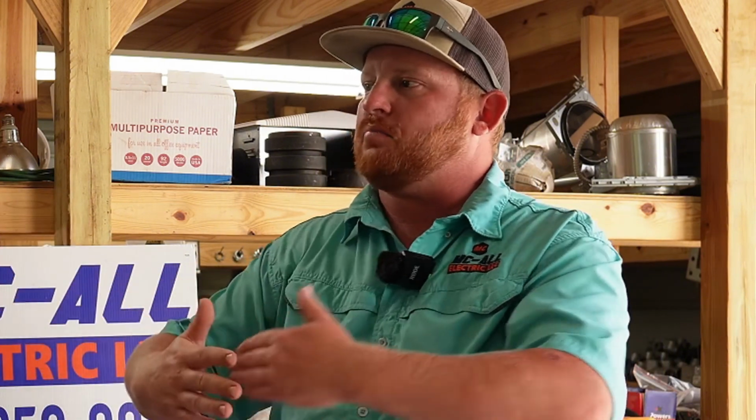So for instance, if I tell you, hey Zach, as your electrician, today in an 8-hour day, we're going to have A to F done. And then you come to me at 2 o'clock and I've got A to C done, then you know, okay, I was waiting on you to finish so my granite guy or my plumber can come in behind you. Now you're 4 hours behind. So then, since I'm communicating with the plumber or the granite guy or drywall guy that's supposed to be there tomorrow morning, I now have to push him back.